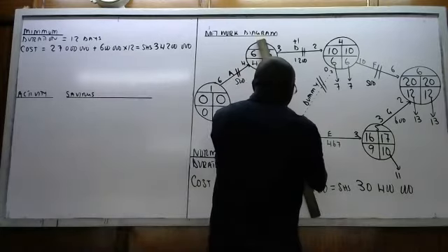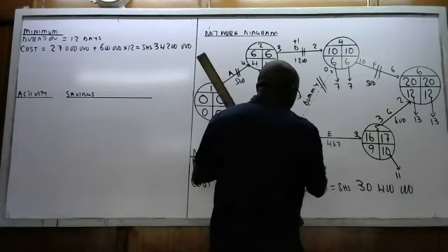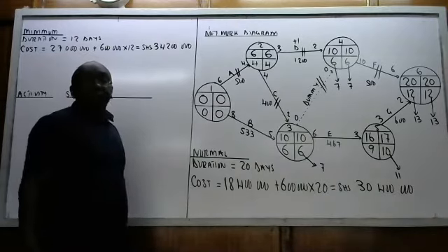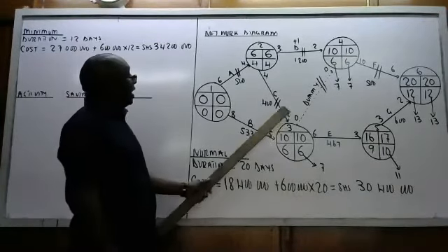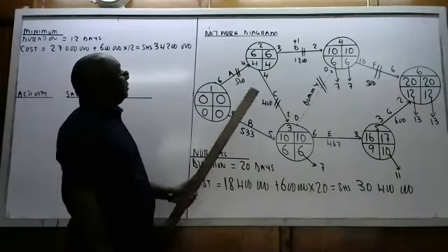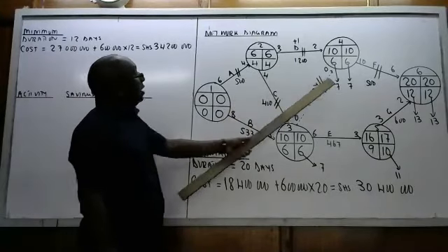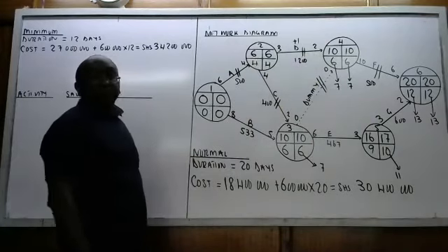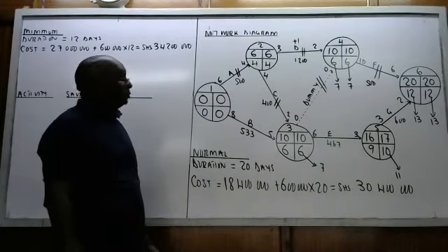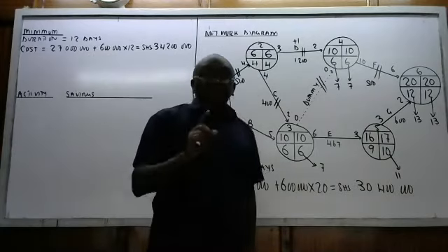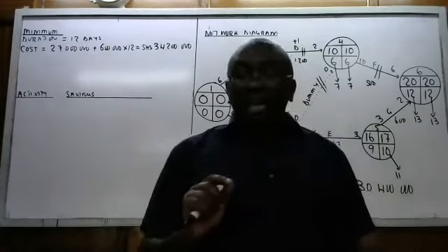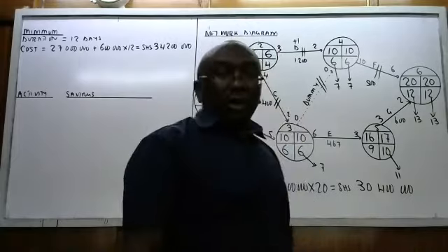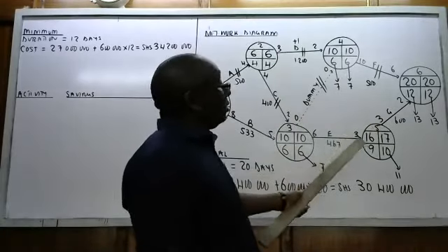So this one now, instead of being 6, it will be 7. Then 7 minus 2, that is 5. And this one will be 7 minus 2 minus 1, 4. So these ones remain. So that is the effect. That is the effect of uncrashing D by 1 day.